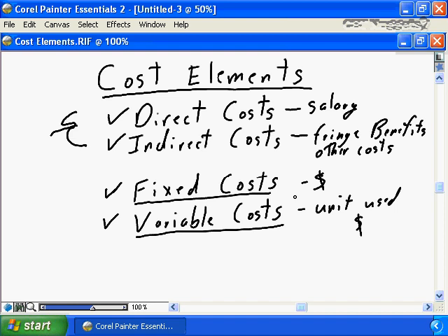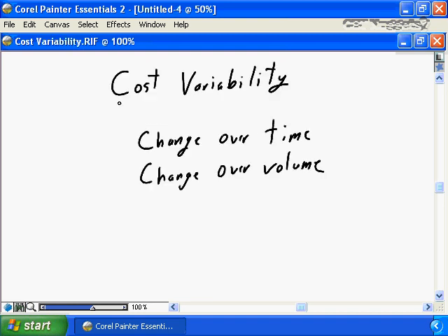You forget that you needed to buy the server. You forget that you needed to buy the piece of equipment, and it simply disappears into the infrastructure. You must ensure that all fixed costs specifically acquired and allocated to your project are included in the overall cost calculations for your project.